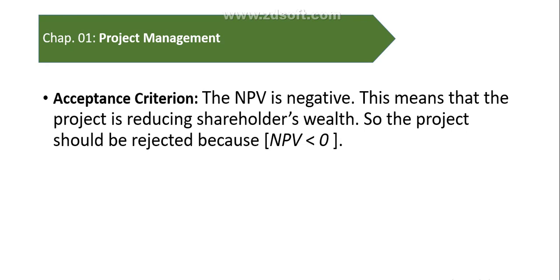Acceptance criteria: if the NPV is negative, remember, we should not accept the project because it reduces the shareholder wealth. If the NPV is positive, then we will accept the project.